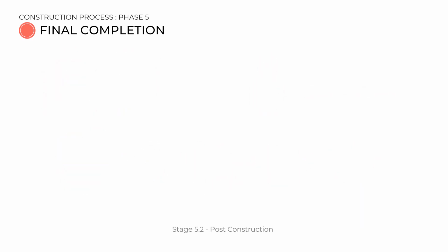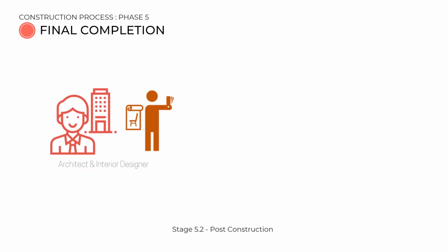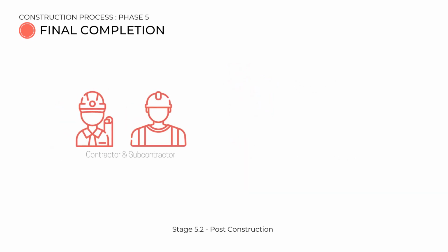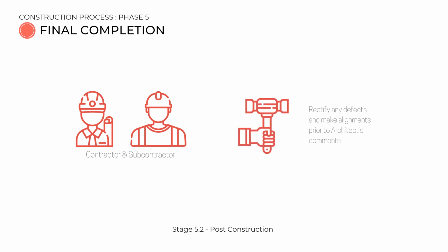During post-construction, the architect and interior designer will conduct a round of inspection of the building. Defects are identified within the defects liability period. However, the contractor and subcontractor should rectify any defects and make alignments prior to the architect's comments.